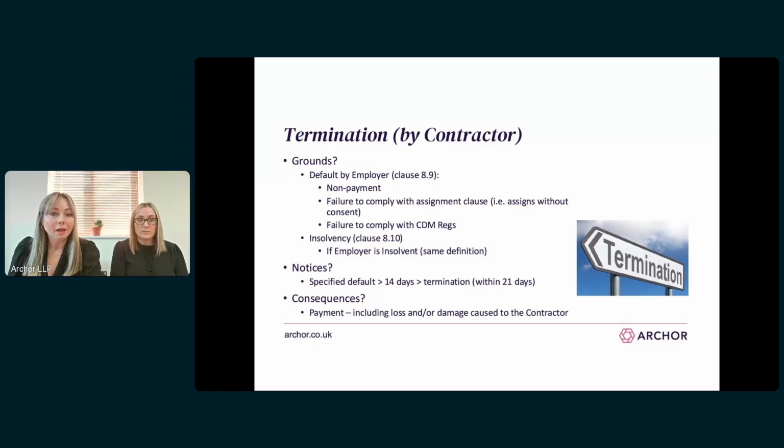As with termination by the employer, there is also an entitlement for the contractor to terminate if the employer becomes insolvent. It's the same definition of insolvency at clause 8.1. And again, the employer needs to actually become insolvent. If it's just rumours, that is not enough.